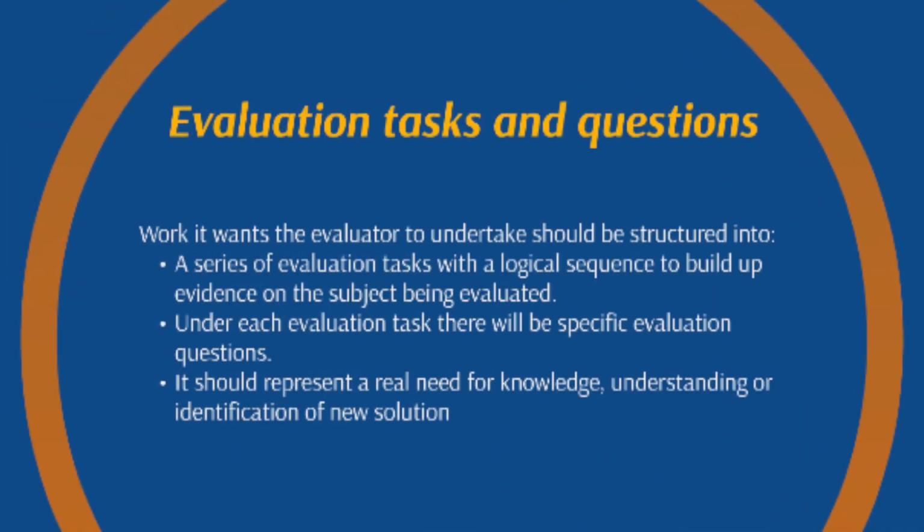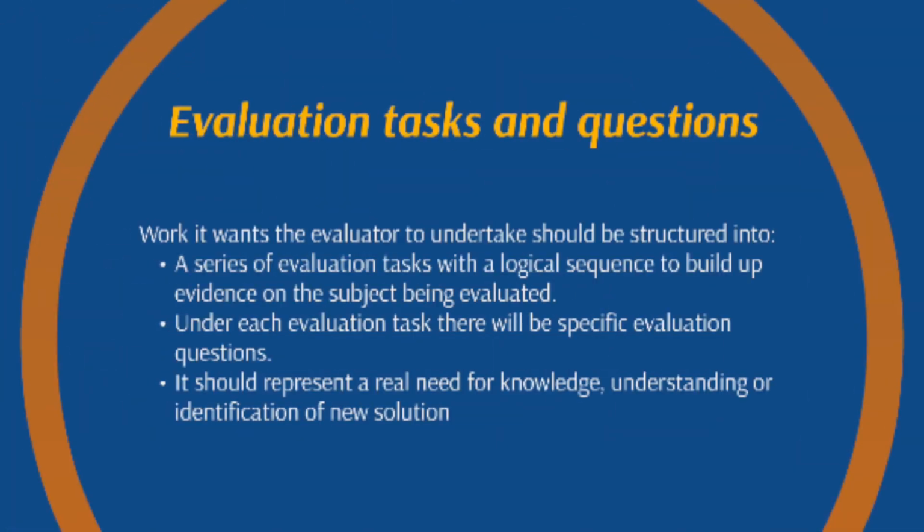So, the way your terms of reference should look like, it has main tasks. These evaluation tasks should be a logical explanation, a step-by-step development of the evaluation itself. Like you start with looking at the literature, okay? Desk review. Then you want to go to field work. Then after, you do case studies. So for every major step, you create a task. And these tasks also have deliverables.